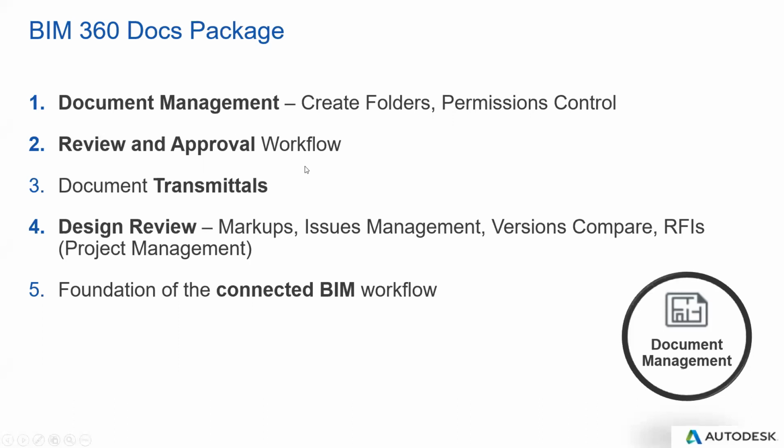For some people, they submit the documents or models for the owners to approve or reject. And also we can use the document transmittals, which means once the documents or the folders have been approved, then we can just select and then pack the document set to the team members. Okay, and then they can receive the email notification and get the link of the zip folder to download.